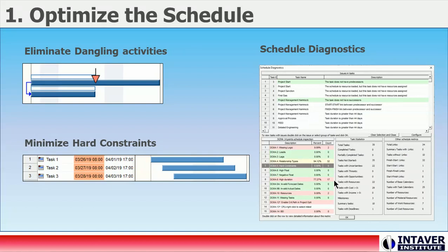Step 1: Optimize the Schedule. Monte Carlo simulation requires that you run hundreds of varying models of your schedule, which means your schedule must update automatically whenever dates or durations change due to risk. If your schedule is not optimized so that it updates automatically, the results of the simulation will often be overly optimistic and thus invalid.